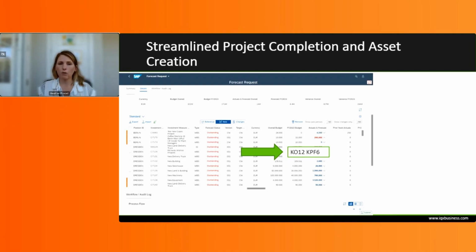So when your next month rolled in, or maybe the next quarter, you need to reforecast, you're able to then retrieve those figures, that final version's forecast figures, so that you have a base to start with, and then you're able to go and reforecast based on the previous forecast that was made. So it really does keep an easier single source of truth within the application. You're storing it within SAP, not on multiple spreadsheets. And so when you retrieve it and when you're manipulating or changing it for the next quarter, you know that your source of truth is correct, and you know where it's coming from.